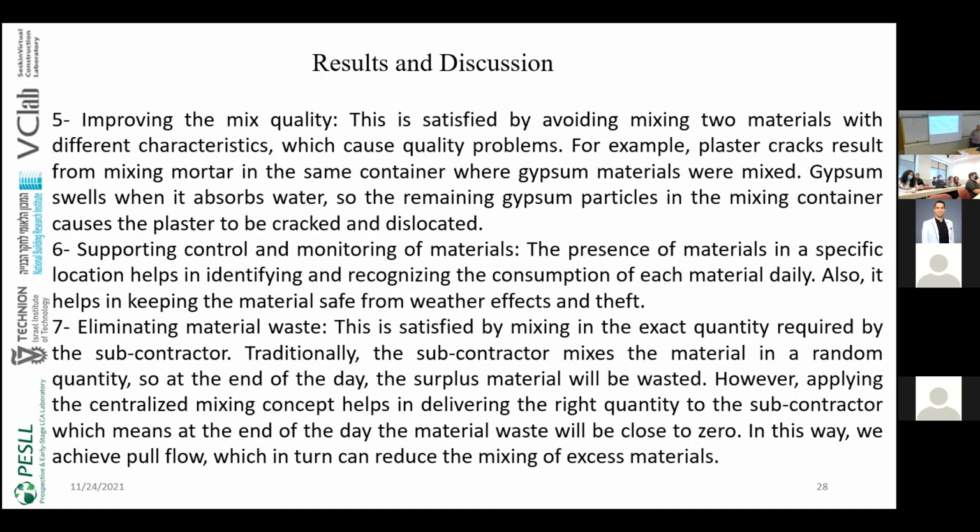Supporting control and monitoring of materials. The presence of material in a specific location helps in identifying and recognizing the daily consumption of the material. Also, it helps in protecting the materials from weather conditions and other conditions on the construction site.